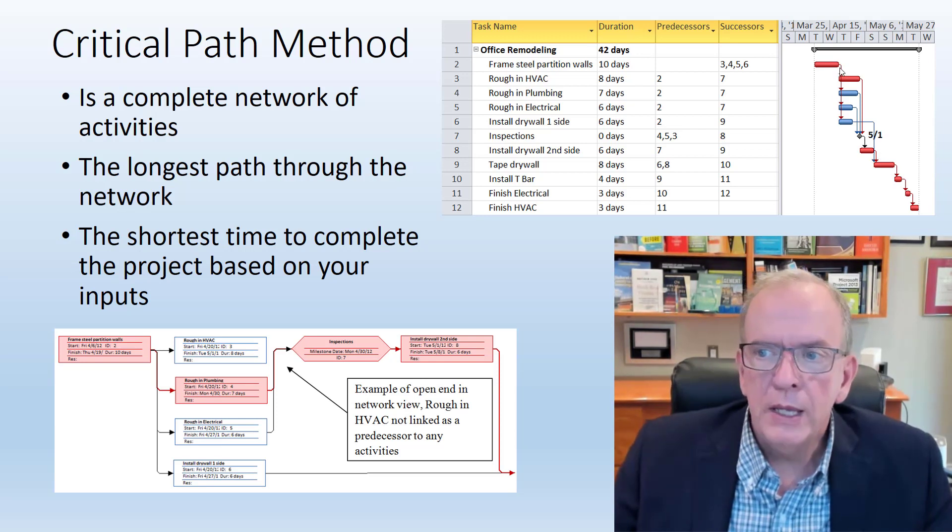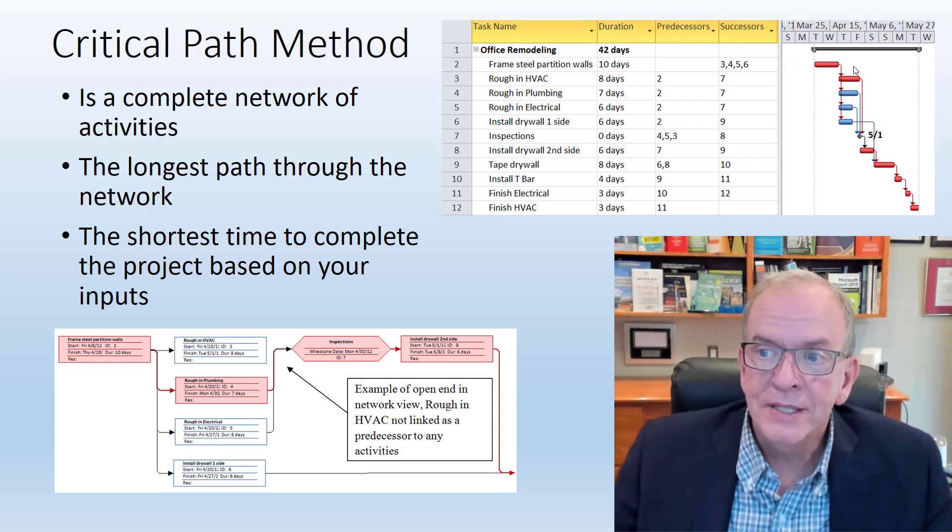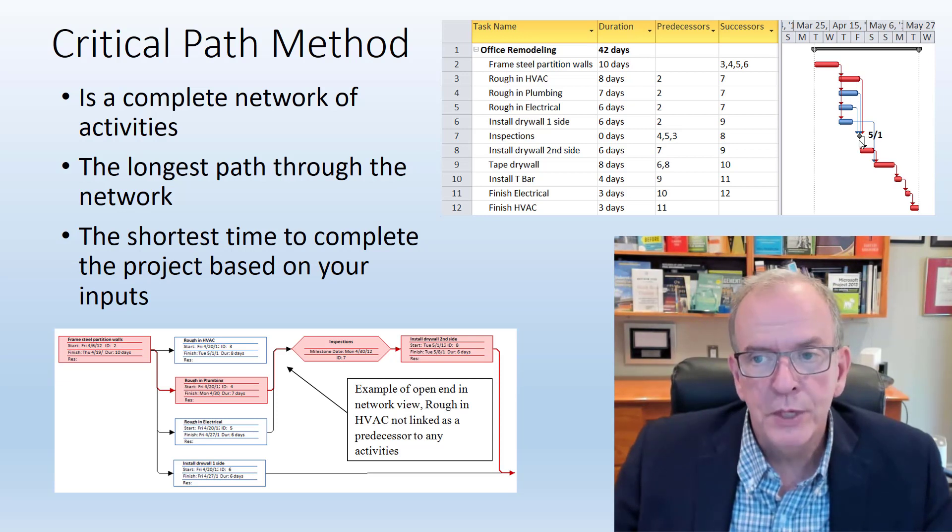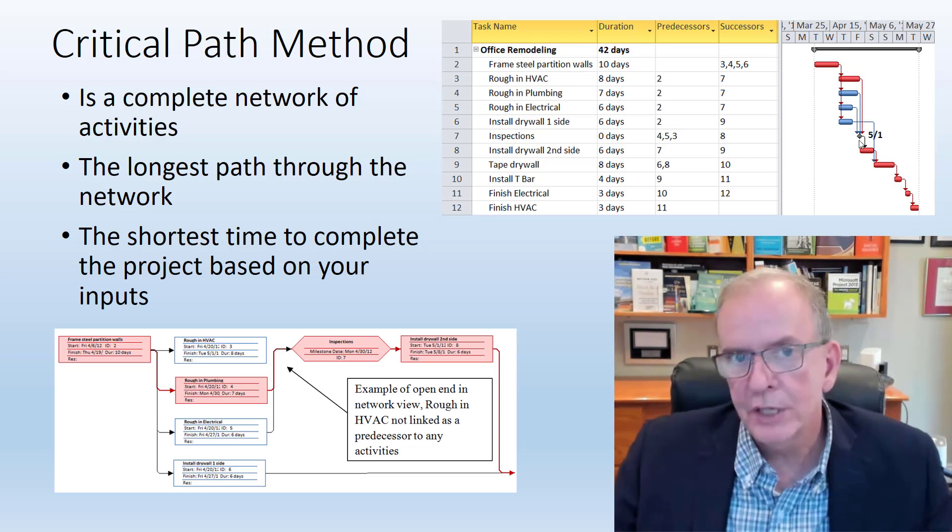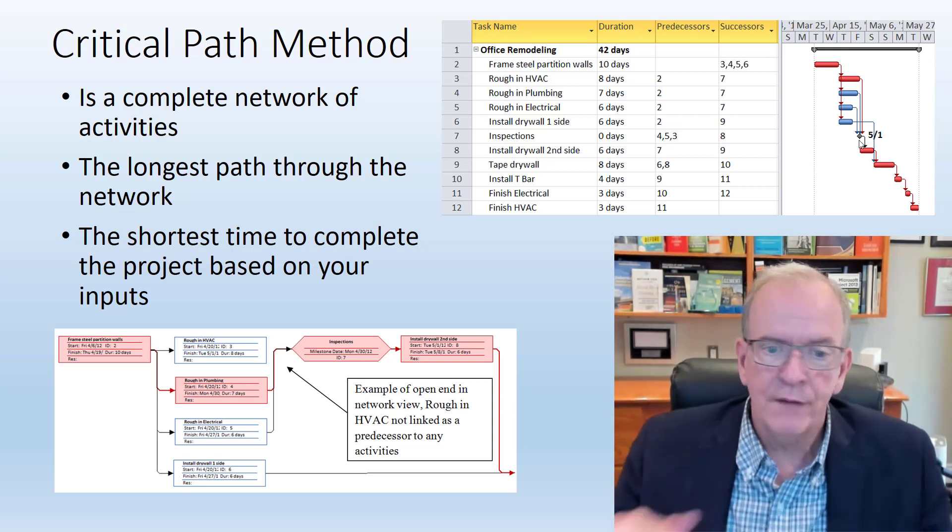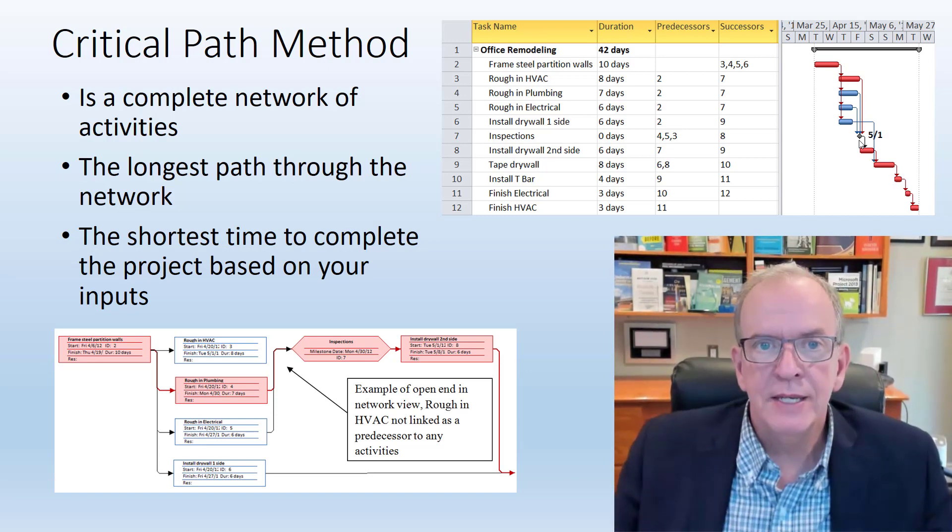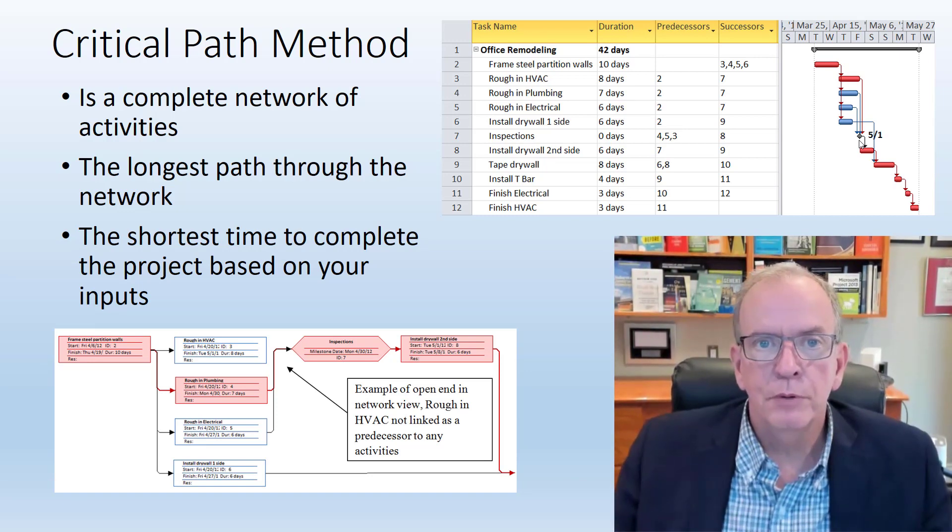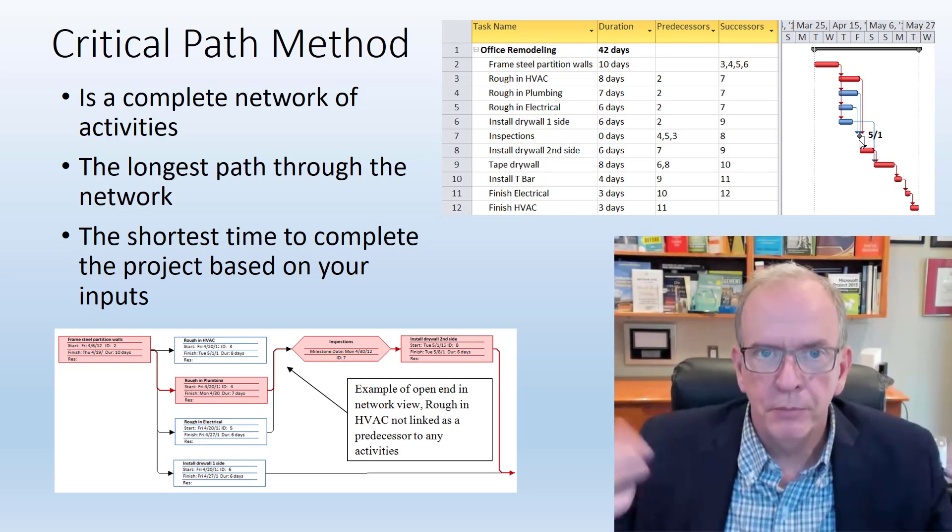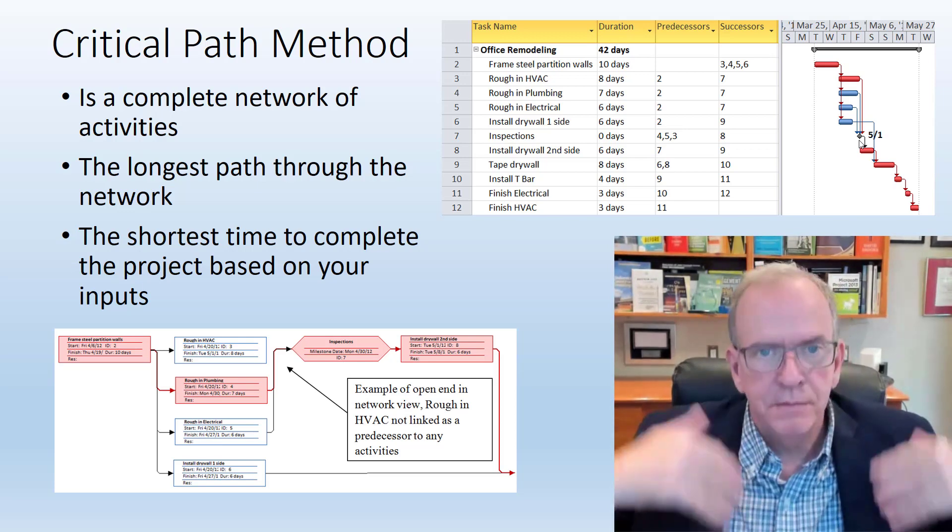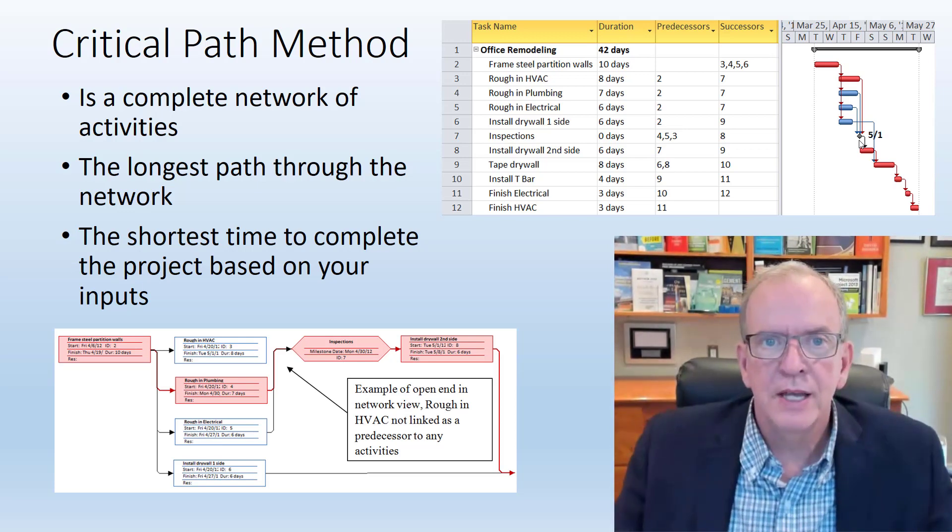We connect them based on what must happen before we start something and what needs to happen after we do something. In construction, think about it, we have to have the roof substrate down before we put the roofing membrane on top of it.